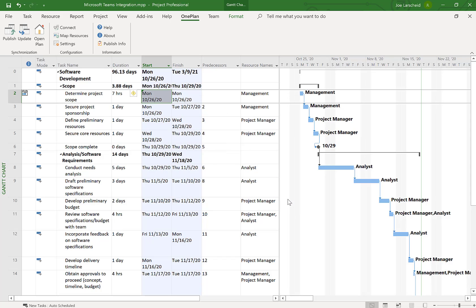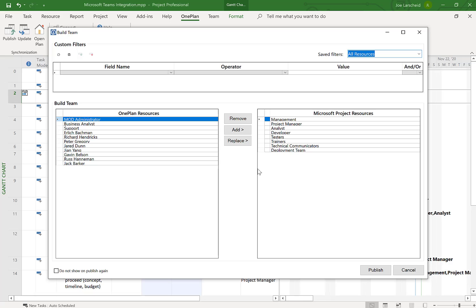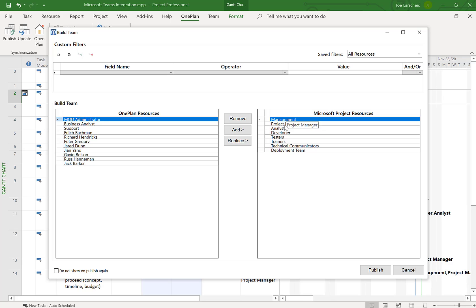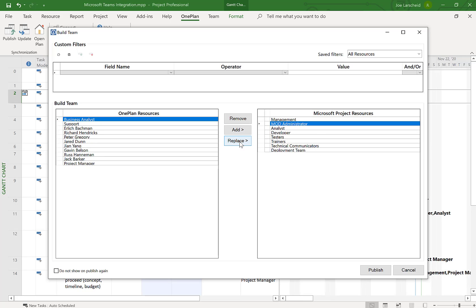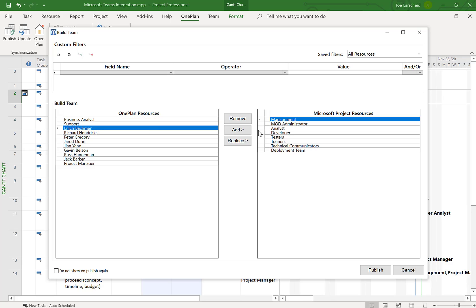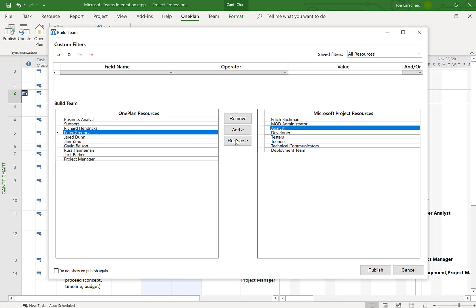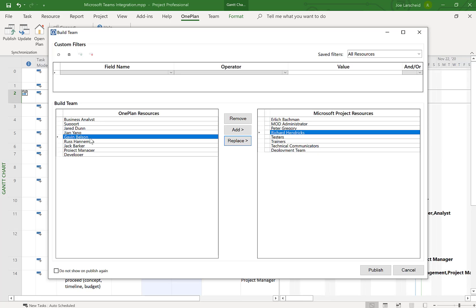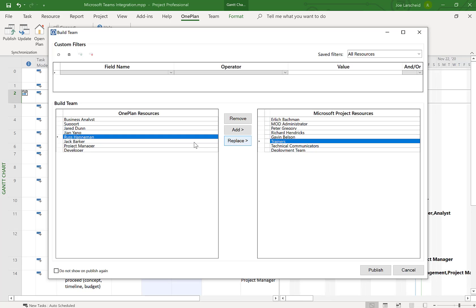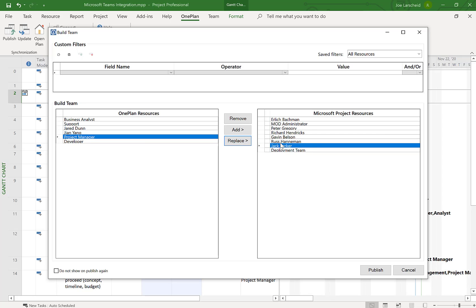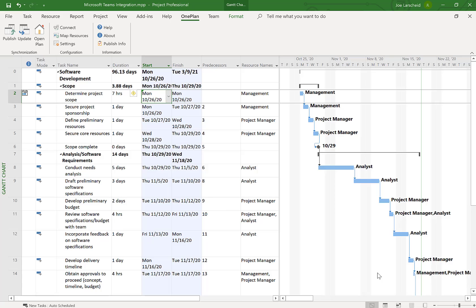With my plan selected, the next step in publishing is mapping resources. You have your resources in your Power App solution's resource center, and you want to map them. I'm mapping myself as administrator to project manager. Ehrlich gets a management position, Peter becomes our analyst, Richard is our developer, Gavin is our tester, Russ is the trainer, and Jack is the technical communicator. Once done mapping resources, I click Publish.